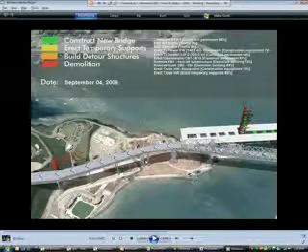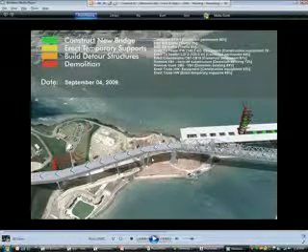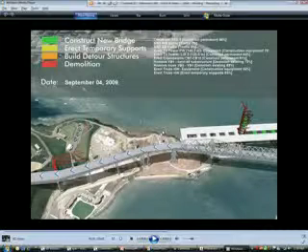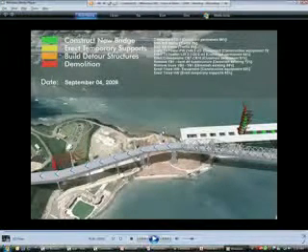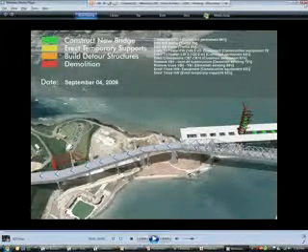They are able to bring in some background images, some imagery to really put it into context of what we're looking at. And you can see they've put in some things, the scaffolding, the cranes, even the laydown areas. They modeled all of that. So this is where they've been able to use 4D and really make sure that they have the proper sequence, that they have the ability to store these items, and that it can go together in this sequence. So this is a great tool to be able to look at not only how a building's put together, but planning out the logistics of the overall site.